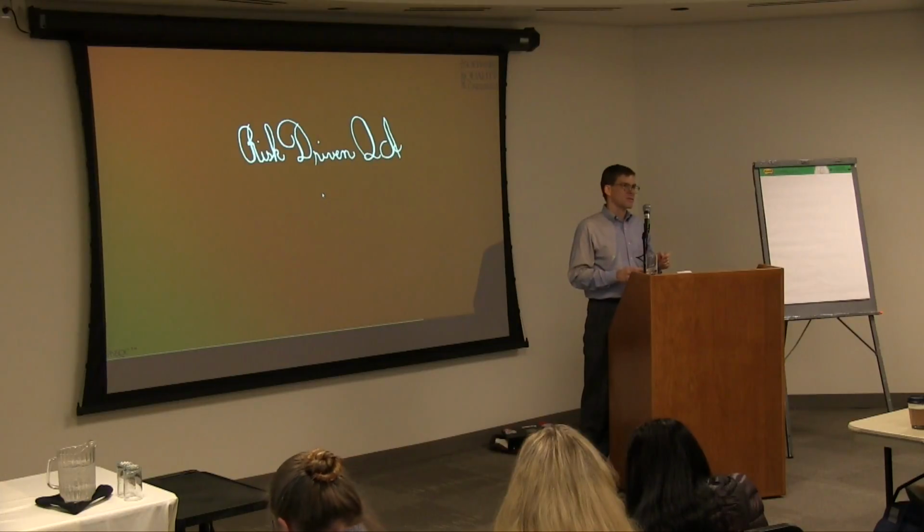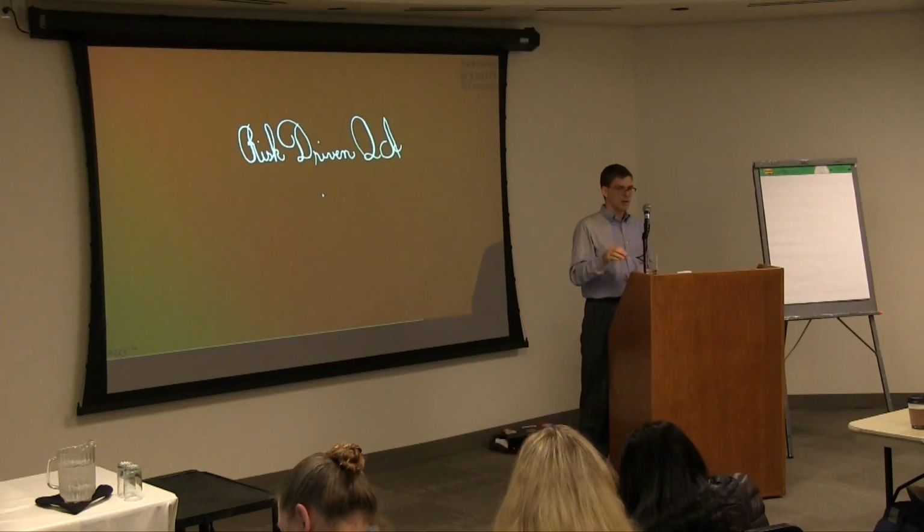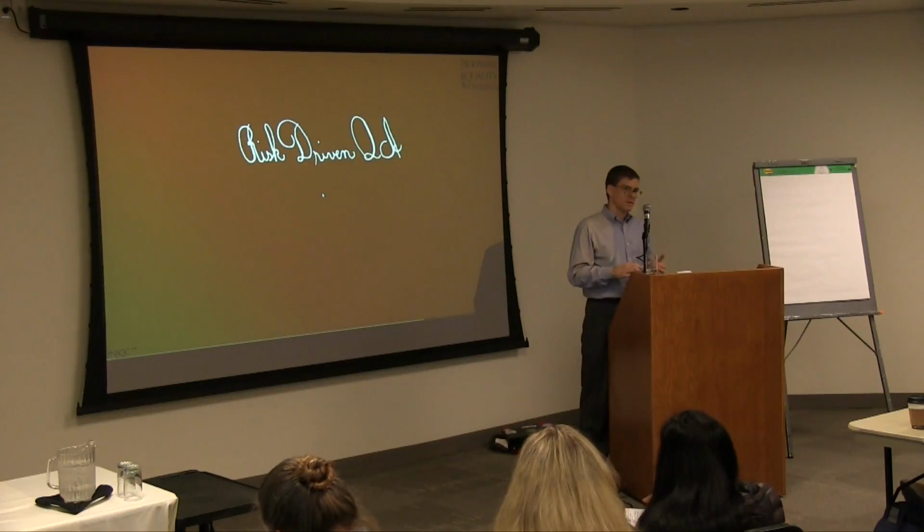An overall risk assessment of high meant that QA would commit to having an automated test committed to the CI pipeline so that we could see that feature go green prior to closing the ticket. So I'll give you some concrete examples of each one of those.